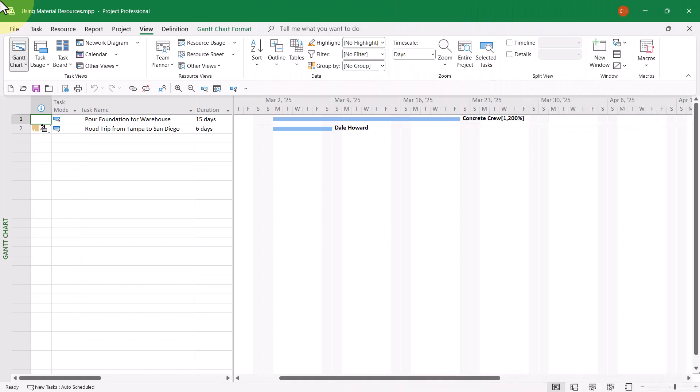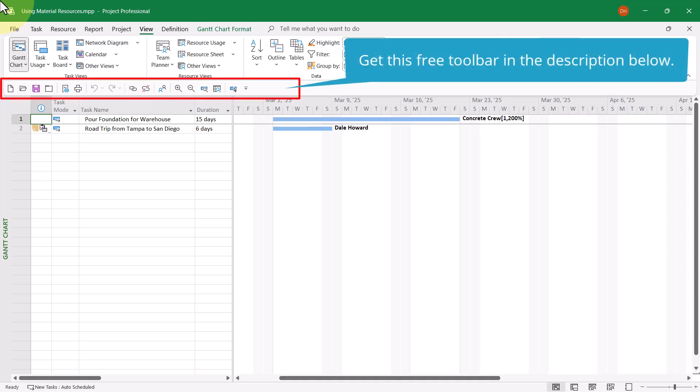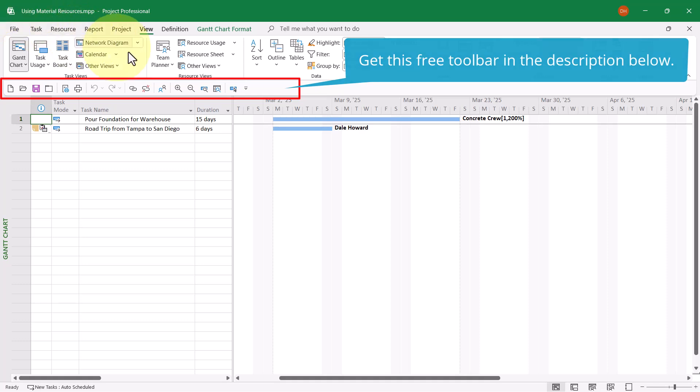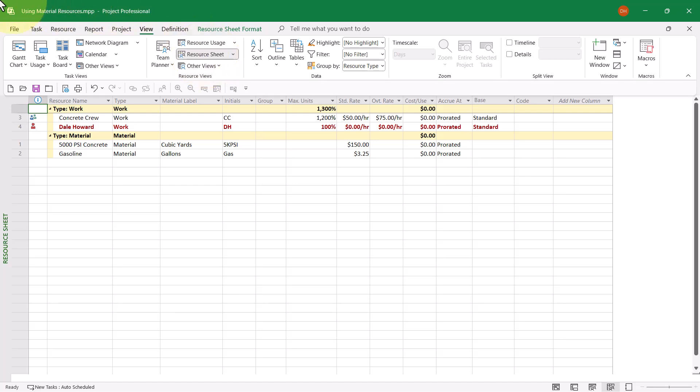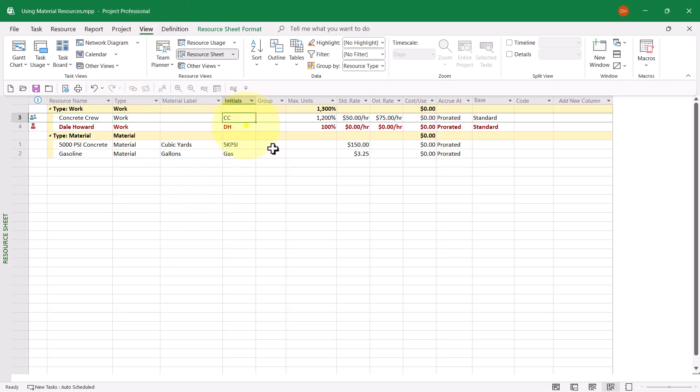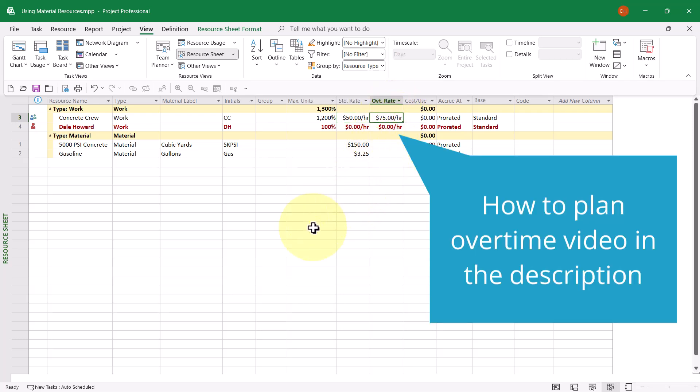Before I show you the two proper ways to assign material resources to tasks in Microsoft Project, let me first show you the resources that are in my project team. When I navigate to the resource sheet view, first notice that I have a generic work resource named Concrete Crew. Notice the type is set to work. The max units value is set to 1,200%, indicating that there are 12 full-time workers in the Concrete Crew. Also, notice I've entered a standard rate of $50 an hour and an overtime rate of $75 per hour. That's per worker.